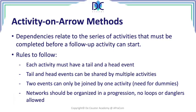Networks should be organized in a progression, going from left to right. There should not be any loops, and there are no danglers. Danglers mean that there is an activity without a head event, which is not allowed. The network should end in one final event, which is the end of the project.